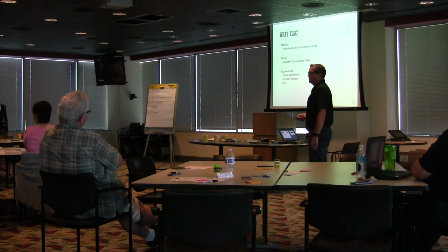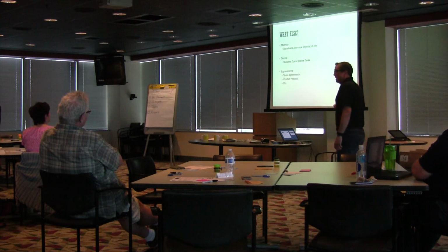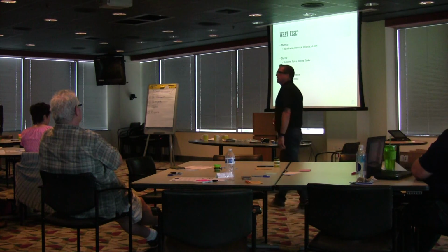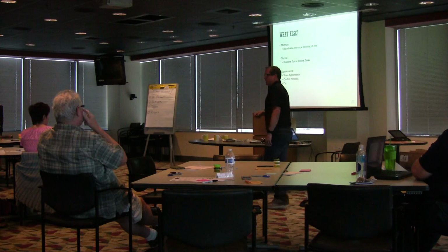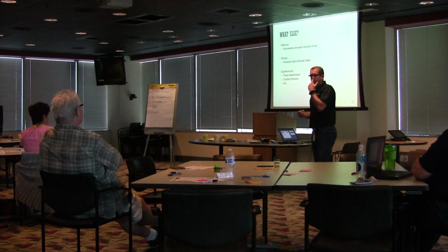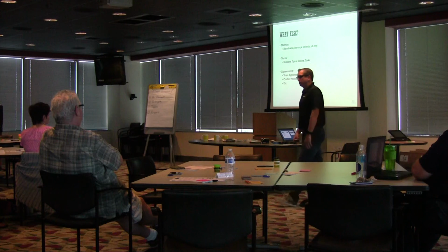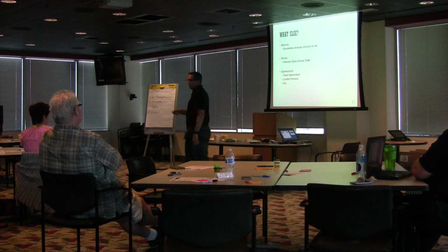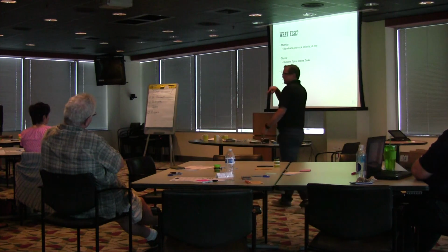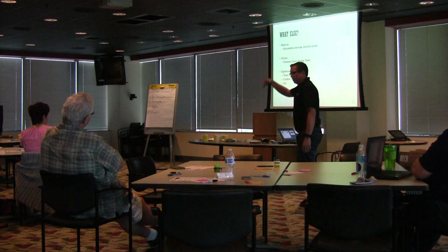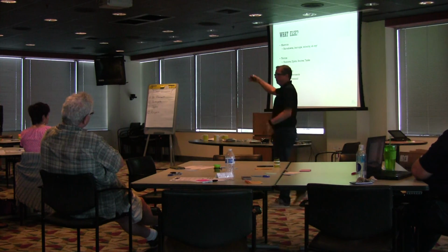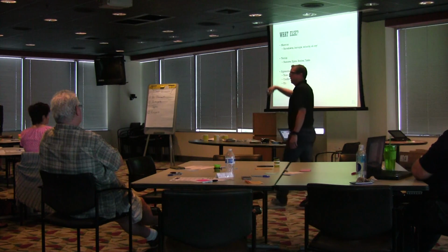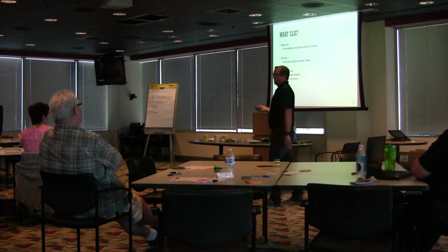So what else do we talk about when we talk about agile teams? We talk about burn downs. These are metrics, right? Burn down. This is how much work we burn down day over day. We do burn ups. This is a projection type of metric that says, based on how much work a team delivers over time, this is where the trend tells us that we'll finish all of this work by this time. That's what a burn up does. Make sense? A burn down is what a sprint, day-to-day, what's remaining. Burn up is over time, here's how much work we've accumulated, and if we were to say we want to be done by sprint 20, here's where we fit based on that trend.